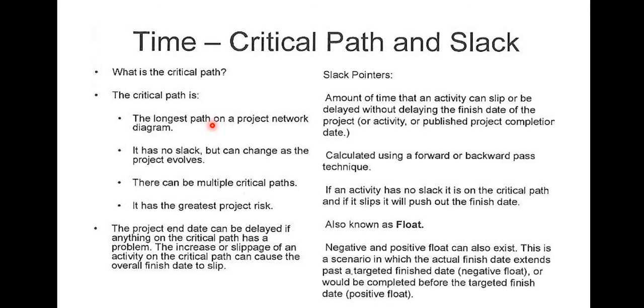Now you can be given a particular question asking you to calculate the slack on a particular activity. So as much as you're going to be given these different details, sometimes you just don't need to calculate anything. You just need to see if the activity is on the critical path, and if yes, just go for 0. So one of the reasons we need to understand and pay attention to some of this information is it buys you time and saves you unnecessary calculation in the exam.